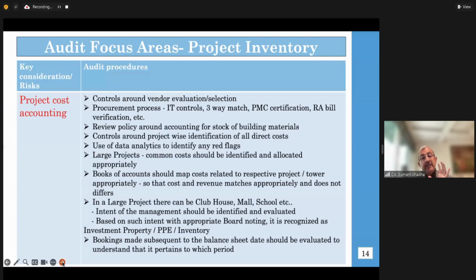If you have a technical bent of mind, rather than relying totally on outsiders, you should have some gut feeling that, in one building, say a 100,000 square feet apartment complex, how much steel would normally be required. If you Google it, ChatGPT may help you, everything is available. So I do my benchmarking, my internal thumb rule benchmarking. Similarly, for other aspects, landscaping: if I'm developing a golf course, how much soil is required, how much sand is required. In the hospitality sector, the cost per room for 5-star is 5 crores, for 3-star is 3 crores, and like that it works today. 10 years back, it was 1 crore and 50 lakhs. So all that is available. If you are interested in doing work in this sector, you should have knowledge of this sector, as if you are yourself a builder or entrepreneur or investor. How would you upgrade your knowledge?